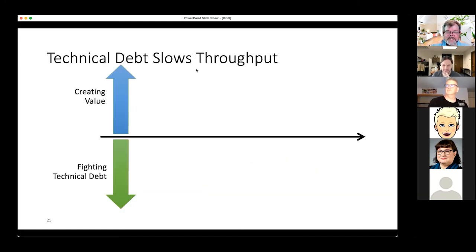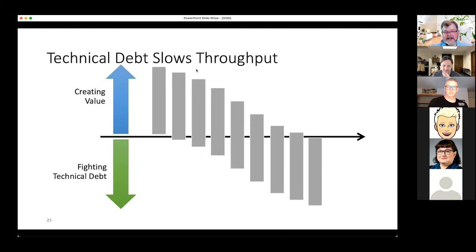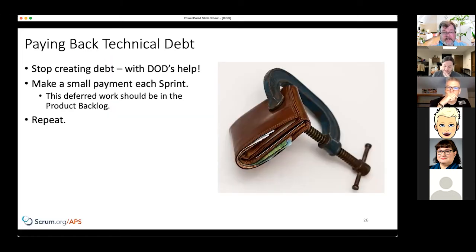So we're trying to get rid of this technical debt also by making our code work better. If we don't do that, if we just let badness continue to grow, pretty soon we get to the point where we spend so much time trying to change our spaghetti code that we end up rewriting the system. Time for a rewrite. The code's too brittle. The definition of done will help.